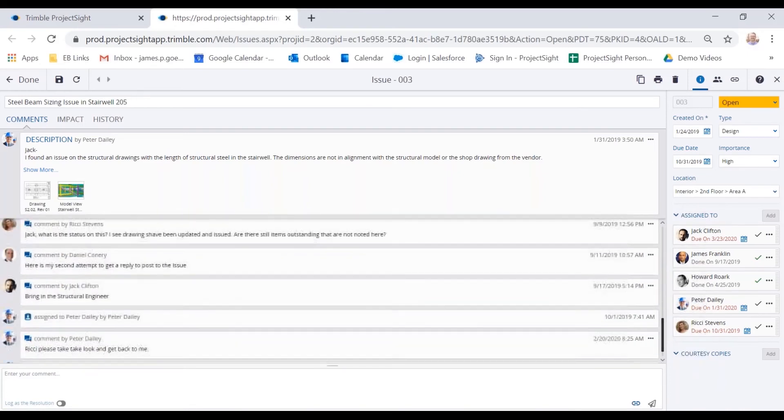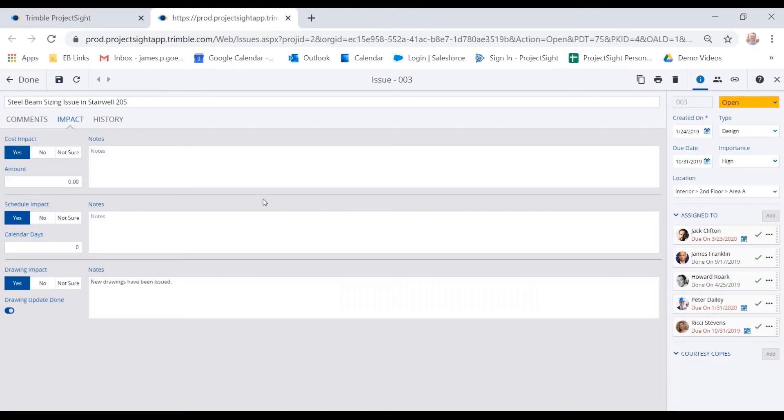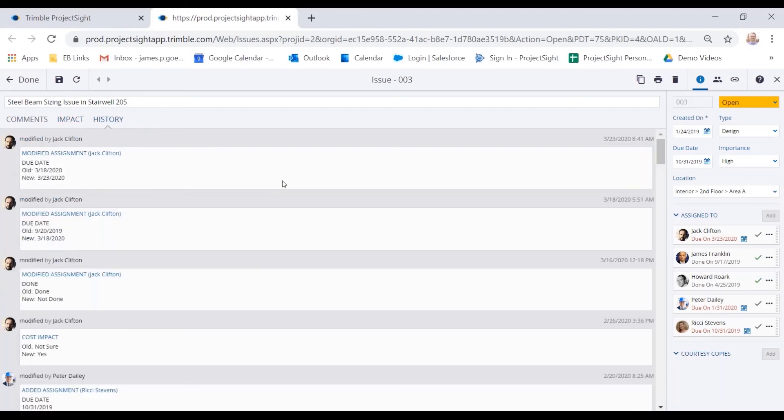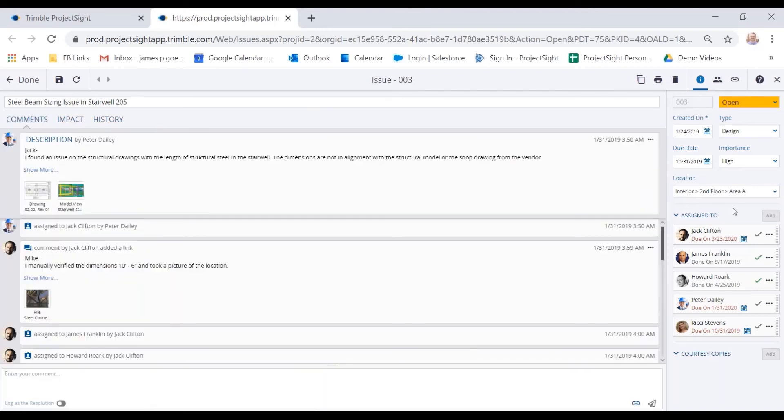So there has been collaboration back and forth between the various teams on this issue. I can see that here. I can also see if there's an impact related to this issue. And that impact might be a cost where I might have to attach this to a potential change order. There's also our history tab. The history tab and the comments tab are very consistent throughout the product when you're dealing with any other type of record. The impact tab might be unique just for issues and it's also on RFIs. But you might have on safety notices a safety input area there as well. On the right side, you'll see those details of the form as well as the various individuals it was assigned to throughout the process and any courtesy copies that I wanted to give out.